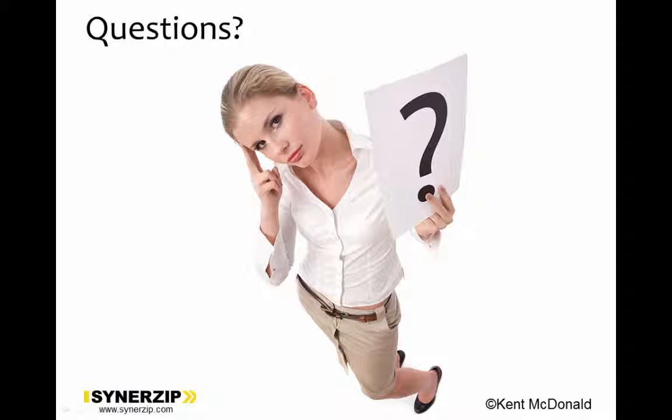And we basically said, what are the things we absolutely need to have in order to meet that time frame? Then as we got closer, we could adjust to say, are we making progress toward getting those things delivered, or are we going to be cutting it short? In which case, the things we would leave out would be stuff dealing with scenarios that would happen less frequently. So we did have the basic things covered, the 20% of things that would deal with 80% of the situations. After that, we asked, what's the next set of things we need to bring in?